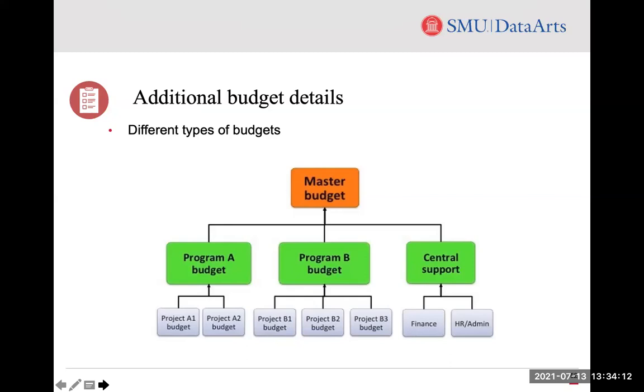All of these program and project budgets should use the same line items as the organizational budget. If you need or want more detail on a program or project budget, make sure they roll up to a line in the main budget.